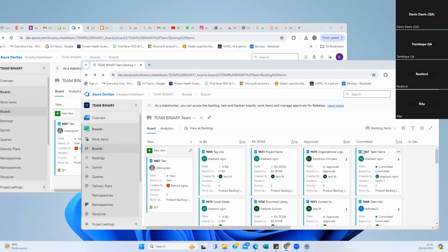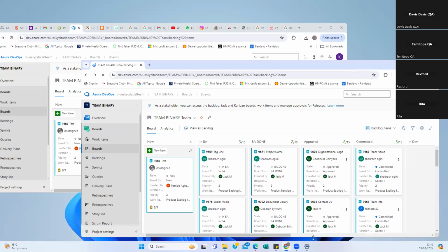So in Agile, when does testing start? These are all part of interview questions. Testing starts from the beginning. From the beginning, why? From the moment that you have your requirement, your acceptance criteria. This is you questioning the BAs. So these are all part of the testing process.